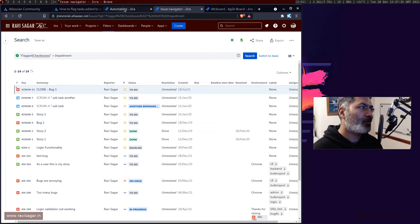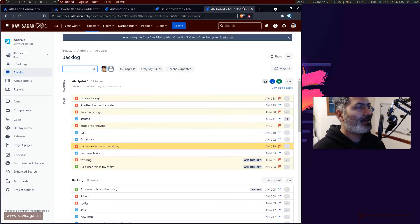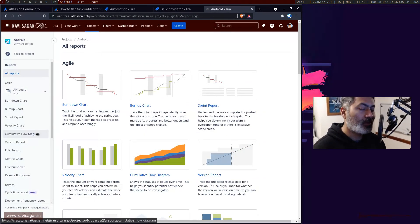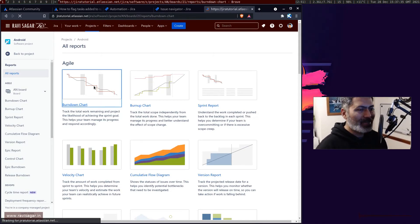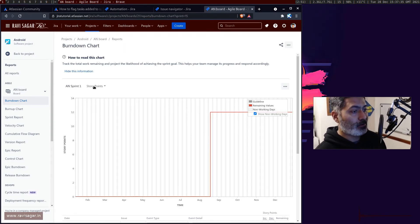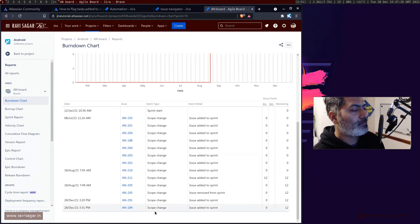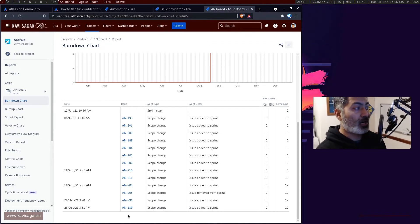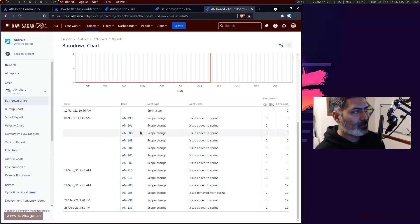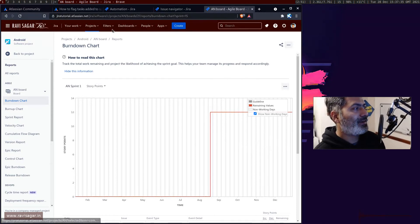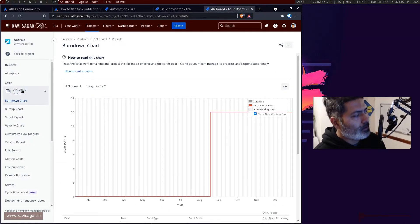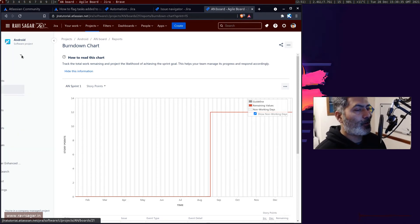If you also go to your project and take a look at the reports, there is something called a burndown chart where you can actually see this information as well. So you may not need to do this automation — there's no harm in doing it, but I want to show you there is also another way. If you look at this particular burndown chart, you will be able to see scope changes. Let us go back to the board and do it one more time to see how it looks on the chart.